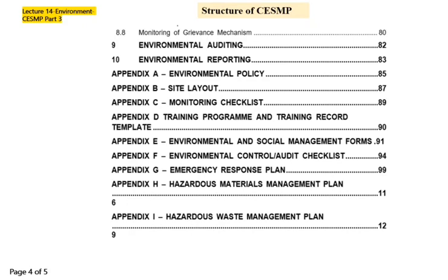Then 10, we have environmental reporting, that is, what our reporting channel will be. For example, if any incident or accident happens, how we will report it. If an accident happens, first we have to send the accident information. Then after investigation, we have to send the accident investigation report within 48 hours or 72 hours. So this is environmental reporting.